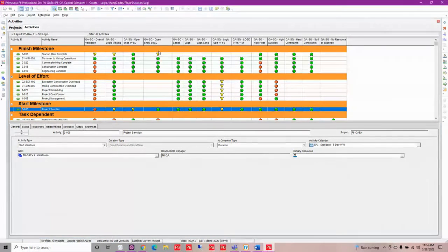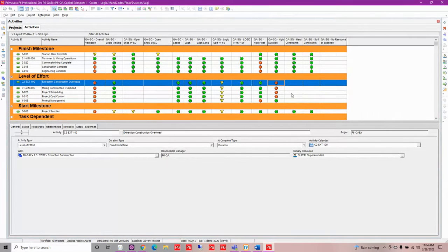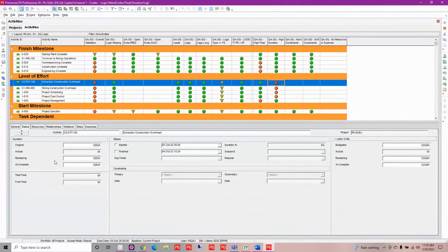So we can see that we've got our hydration over here. We've got some that are marked red, and I don't know why it does that to me, but I can see that I might want to dig in and see what kind of hydration we're looking at. So remember, we did 240 hours. It's flagging that for me because this one is 6,262 hours. So you could handle this. Maybe you would want to split up this activity, since it has a longer duration.